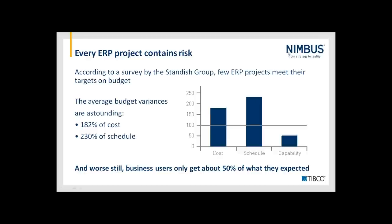We found a group who specialize in looking at ERP projects and potential success and failure reasons. They carried out a survey and found some quite surprising results. On average, 182% of ERP projects ran over cost, and the time taken to deliver those ERP projects ran over by 230%. So they were costing twice as much to deliver and taking twice as long as expected. And the worst thing was, not only was it costing more and taking more time, but the business customers were getting much less than they expected from the new ERP implementation.